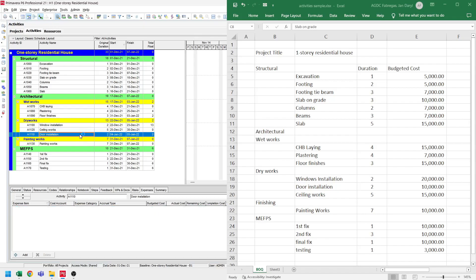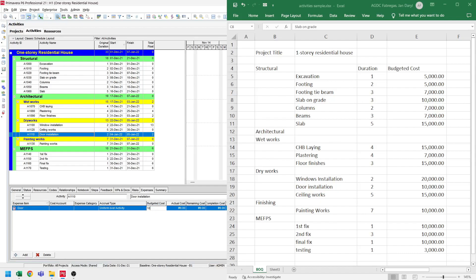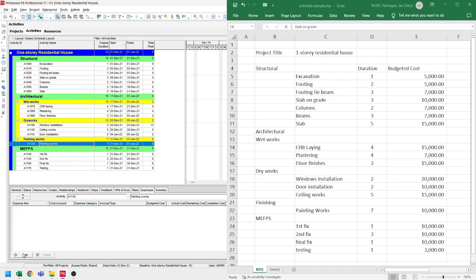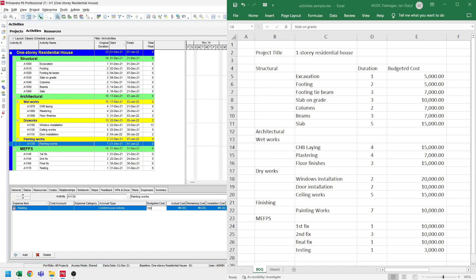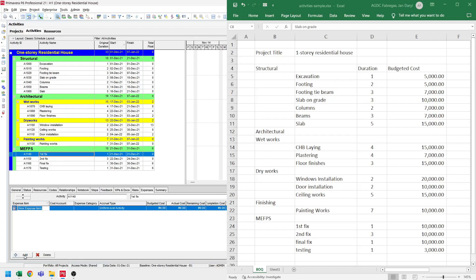For door installation, let's select the door installation. Let's click add, enter the name of the expense item, then type in $10,000 in the budgeted cost. Now for the painting works, we select the painting works, add the expense item, and set the budgeted cost to $10,000. For the MEP first fix, we select the first fix activity, add an expense item, type in 'first fix', and set the budgeted cost to $10,000 based on our BOQ.